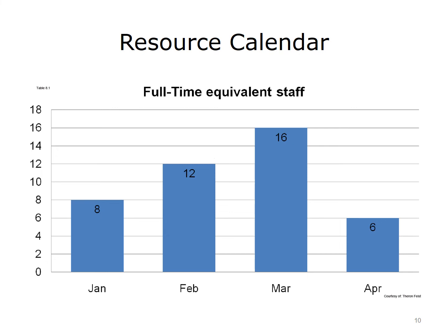Unit staffing schedules are created 6 to 8 weeks before that schedule is to start. The schedules are finalized 2 to 3 weeks before the first day of the schedule. This needs to be taken into account when planning resources from the nursing unit.